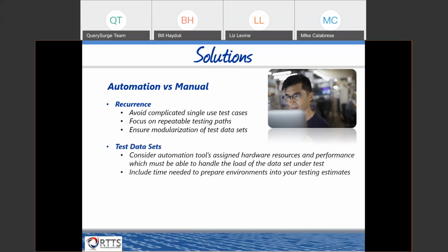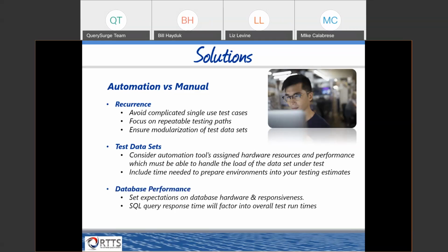The test data sets themselves, how much data you're testing. You want to make sure that if you're going to select an automation tool, that the assigned hardware resources and performance of that tool is able to handle the load of the data sets that are under test here. And you also need to make sure that in any estimations that you're giving for your testing effort, that you're including the time that's needed to prepare these environments. Data setup does become integral, especially when dealing with automation tests, as you want them to be repeatable and understandable.